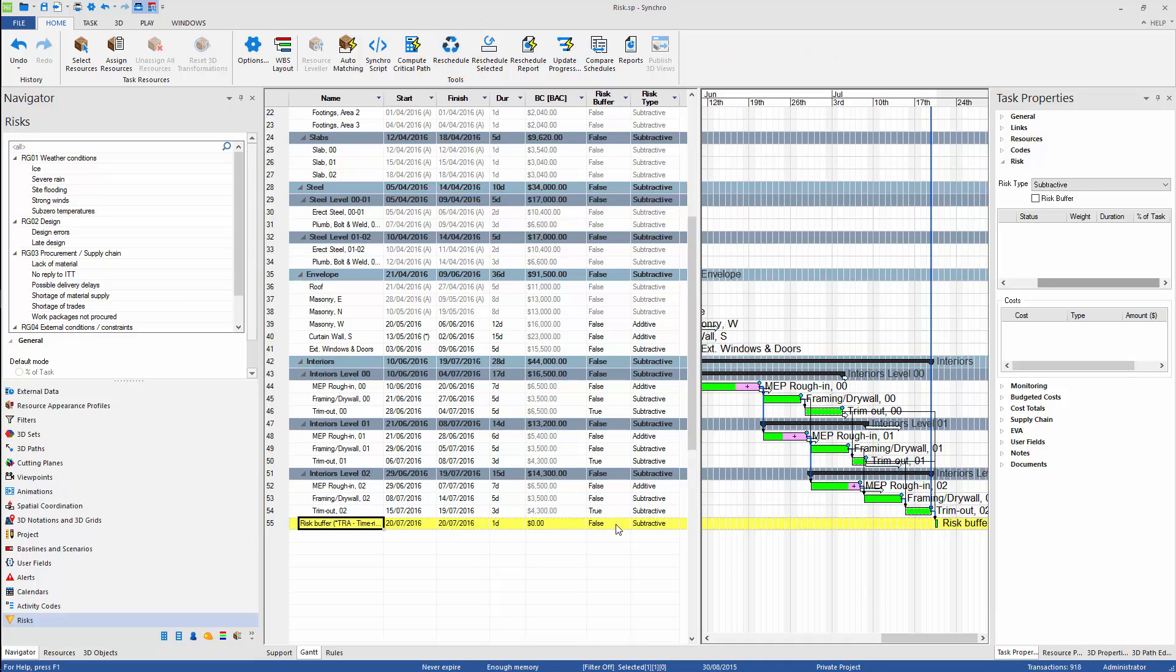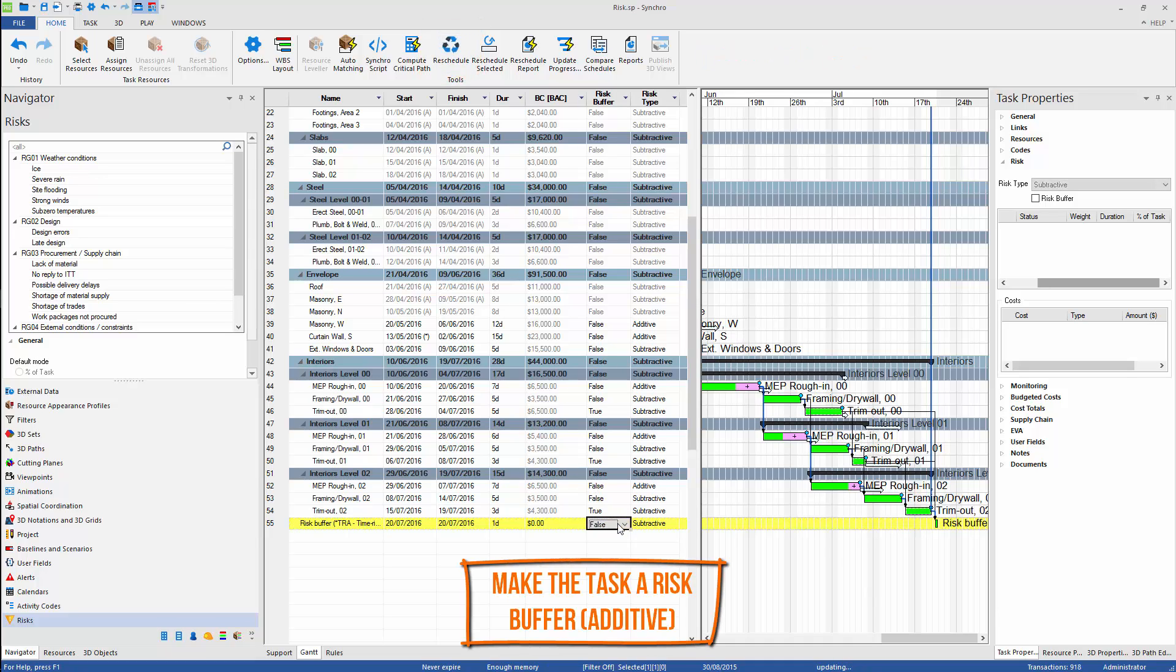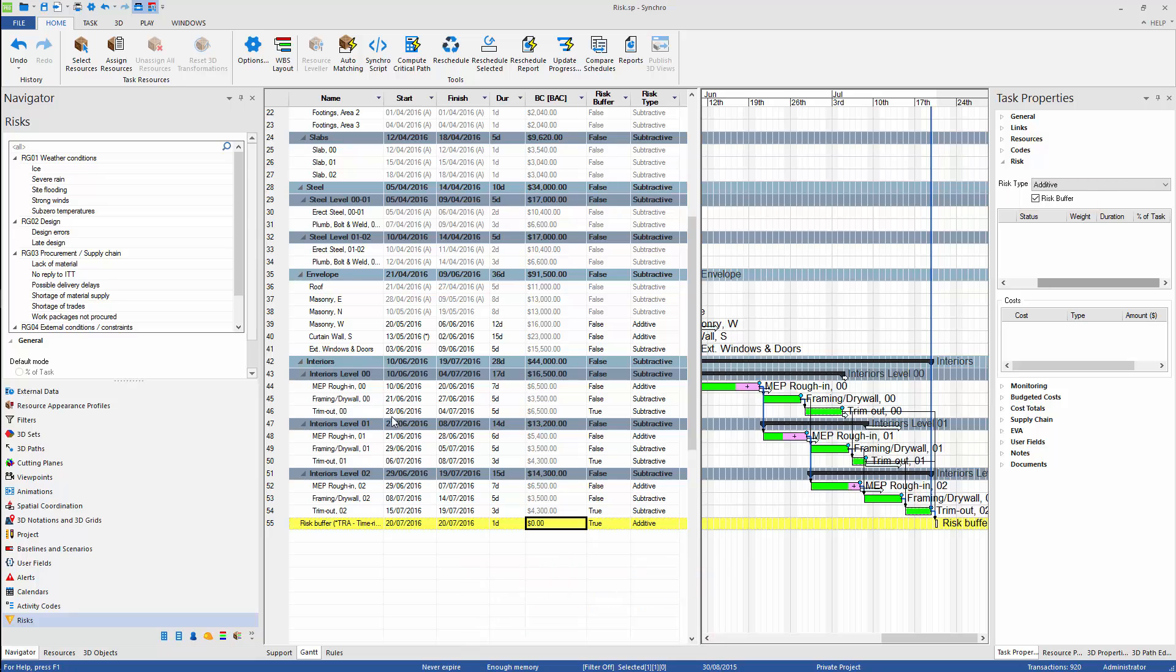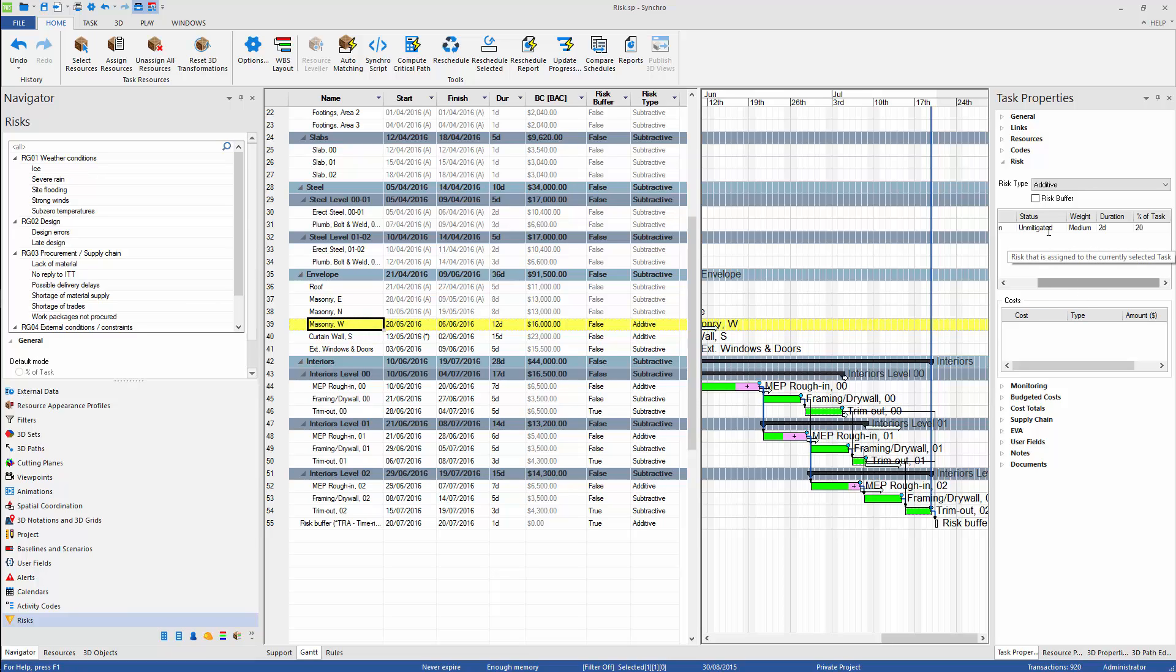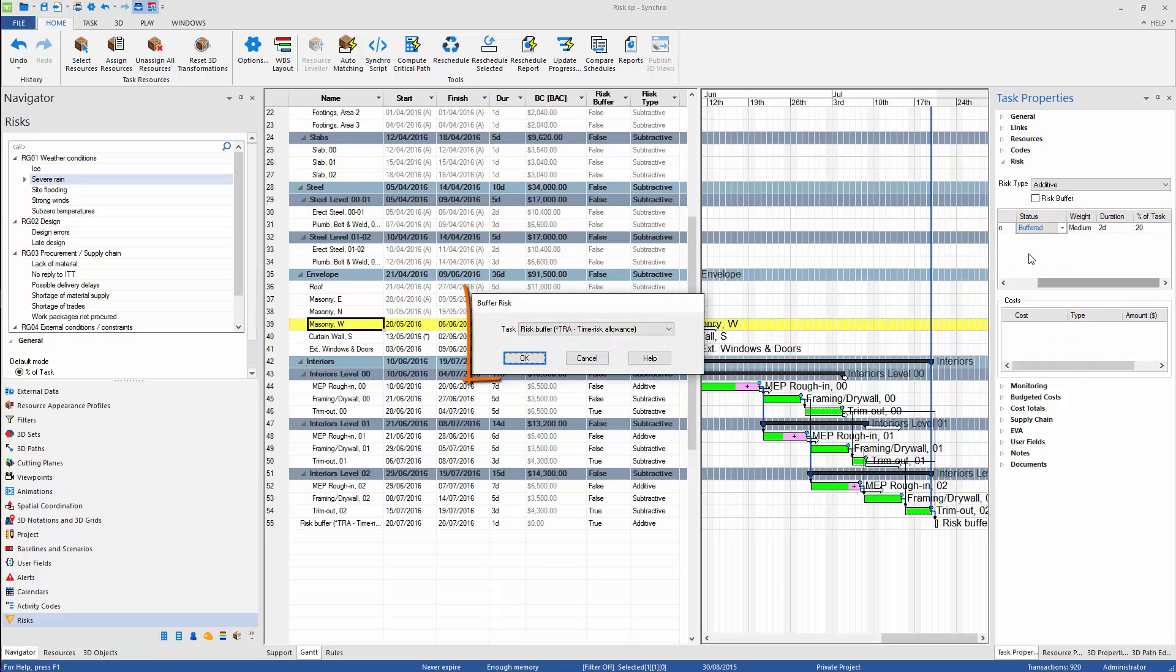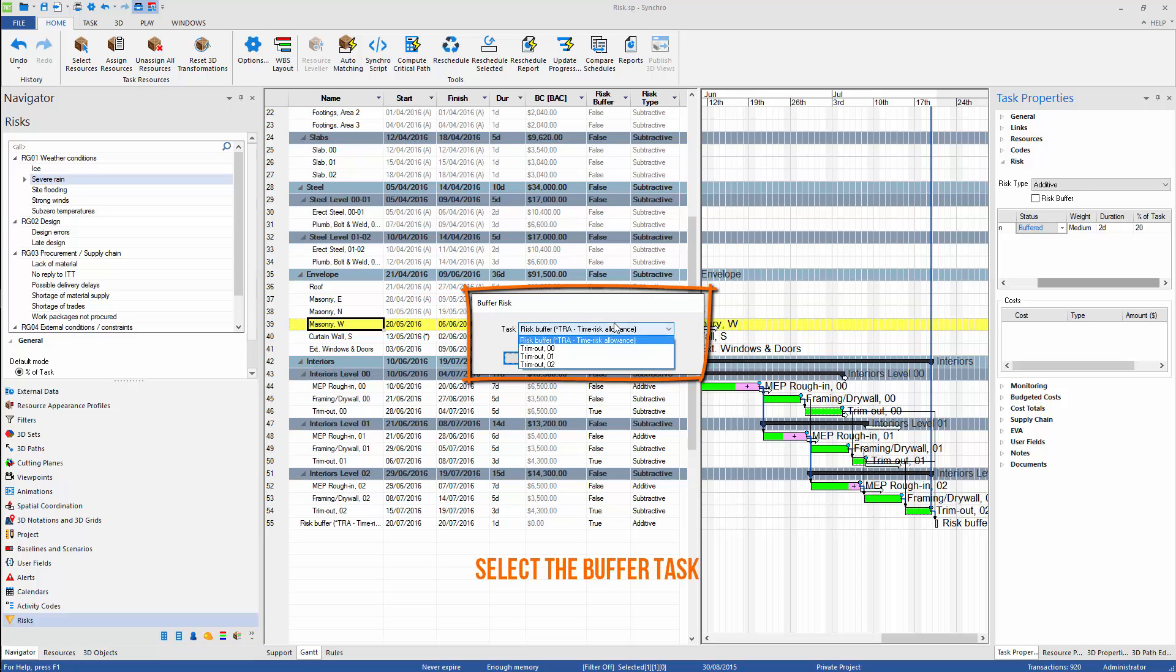First, we need to create or designate one task to act as a buffer. From already identified risks, we can select the ones which we want to buffer. We can do so by changing the attribute from unmitigated to buffered. Then we need to select our buffer from the list.